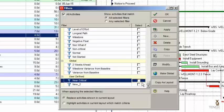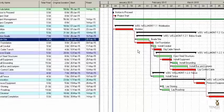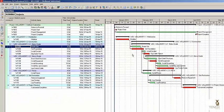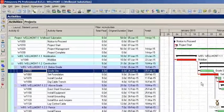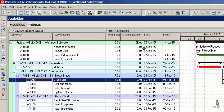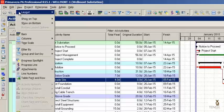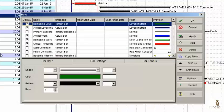Turn it off for now — we don't need it on just yet. Select OK. The next step in the process of creating a way to monitor near critical activities is to create a bar. Let's go to the bar dialog, which is the bars icon in the top layout tool group, or you can go through the top drop-down menu: View, Bars, and that brings up the bars dialog.